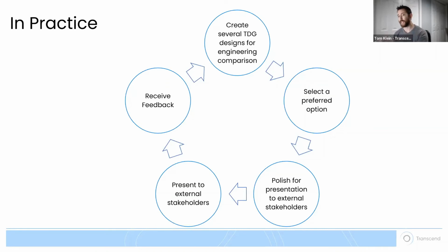You could use the Transcend design generator, create a single design, take it to the township meeting, receive their feedback, and repeat. That method, using the software, has some inherent value in that you didn't commit a lot of time or effort or money into creating that conceptual design. However, you're still, unfortunately, at the mercy of the whole cycle here. So even if you don't spend very much time on that design, you still have to get on the township agendas, you still have to get in front of people and schedule things. And that in itself could still drag the project on for a while.